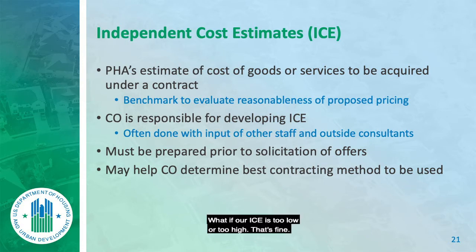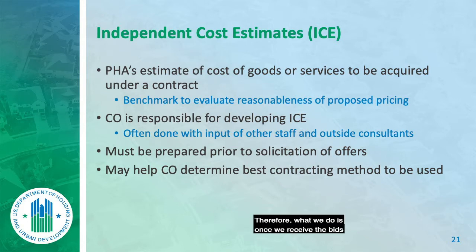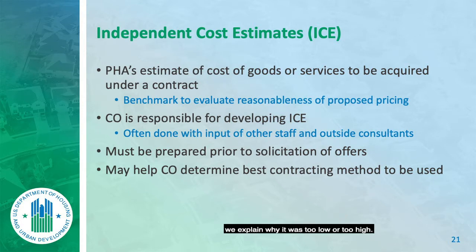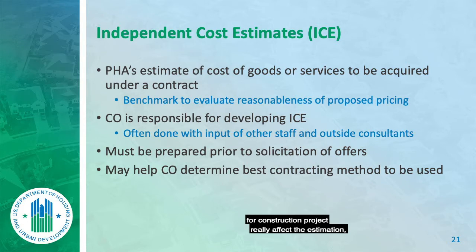What if our ICE is too low or too high? That's fine — it's an estimate, not a fact. Once we receive the bids, if our ICE was too low or too high, we explain why. Market conditions, even within weeks for construction projects, can really affect the estimates.